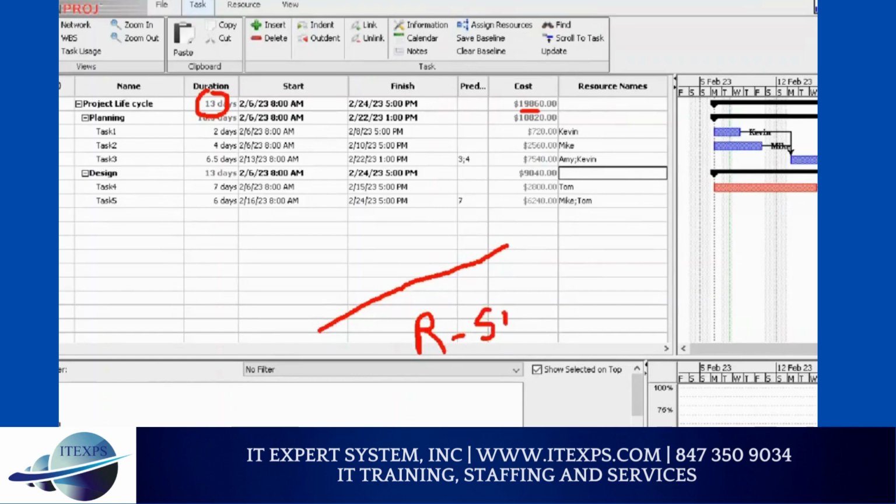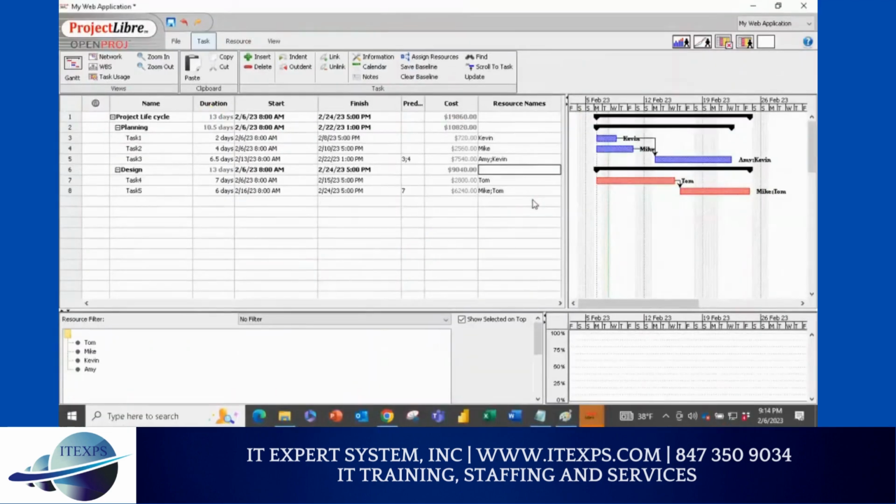This is called resource smoothing. Resource smoothing means no one should work up and down; they work approximately equal hours. Or resource leveling. Through that, we reduce the project cost and we reduce the project duration. This is the expertise we bring to the table. Now they are kind of equally utilized. Make sense? Questions, concerns, doubts?